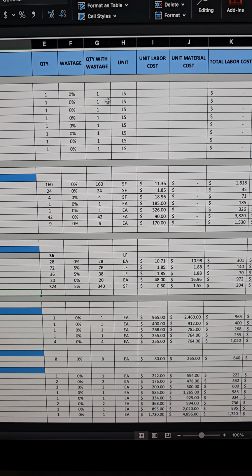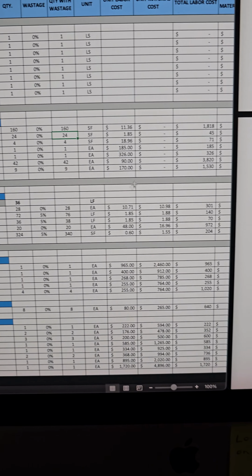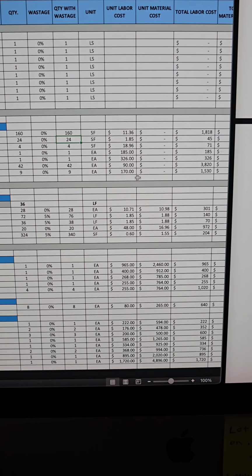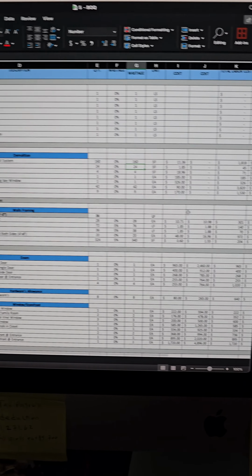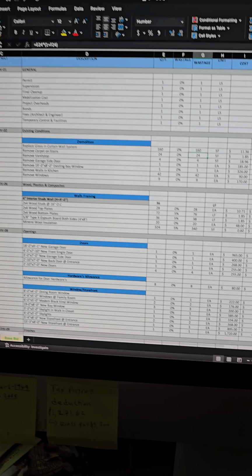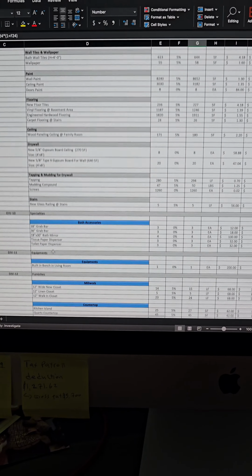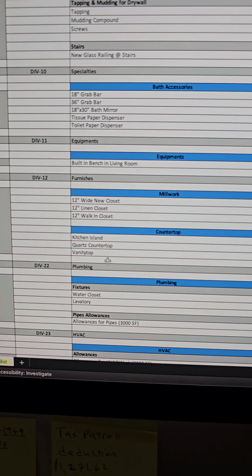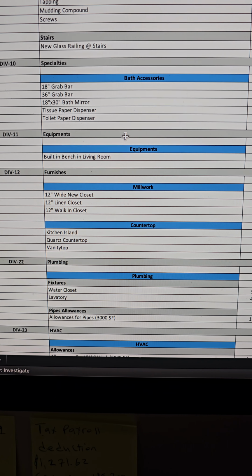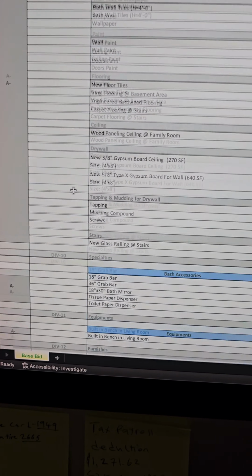And then we have a column that has the unit, the takeoff for the unit, and your price per unit, whether it's price per square foot or you do material plus labor, whatever pricing system you have. So this is the best way. That way you can ensure that you have an accurate quote. You're not missing anything. Each area is identified by the divisions, division 1 and onward.